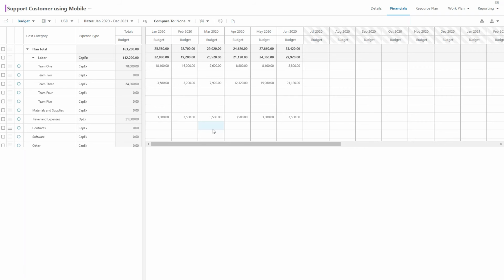You can see we've got a pretty steady state of travel and expenses we're anticipating. And if we were to purchase software or something else, we could fill that in here and build up the budget for this particular initiative. So now, for this epic, I have my business case information. I have the initial information that we brought in from ideation, and now I've rounded that out with an initial pass on resourcing demand and budget so that I can start to make some portfolio decisions.